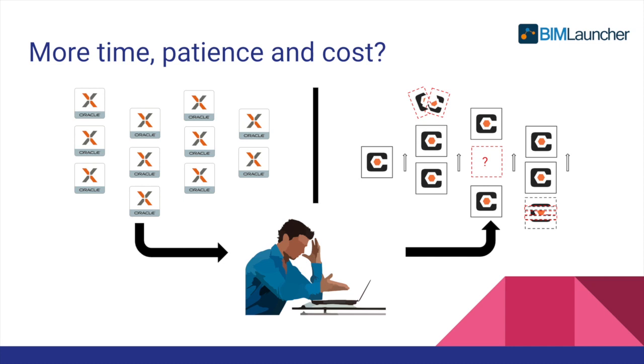And once again, if we bring it back to the quality assurance side of things, you have to have all this information brought across and checked. More often than not, you'll find missing versions of files, broken files, or metadata missing because it's not compatible with that system. That fundamentally breaks the potential for that golden thread of information as it flows through the various stages of the workflow.